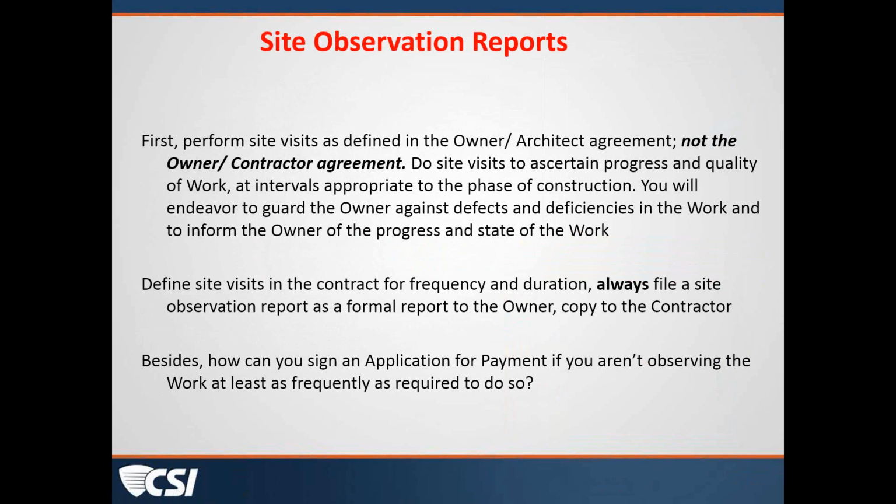If we aren't in the practice of doing these things for a particular project, then as an example, how could we execute an application for payment if we're not there with enough frequency to take a look at the progress of the work before it's covered up? At the very least, there's a frequency demanded by our involvement in the application for payment process, and that would demand a certain amount of time on the job site. So this is just a touch on what kinds of things are within our agreements related to site observations.